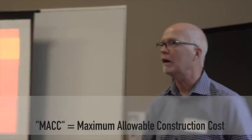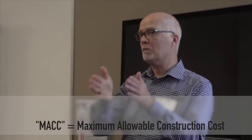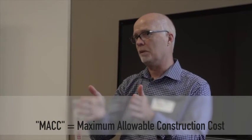Any questions? Oh, yeah, so the MAC is what you're saying. We have not finalized the contract with Sound Transit. We're in the pre-construction phase, so this is common in the practice. The pricing that we get with this bidding effort that we're going through in the next couple of months will be the basis of helping us finally establish our MAC, maximum allowable construction cost, that will be approved by Sound Transit. We're trying to target getting in front of the Sound Transit board in February. But right now, we're it.